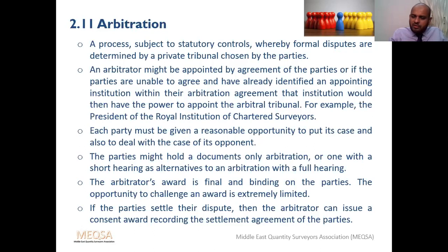They will favor the facts and evidence. So it is just a reference only. You will refer one arbitrator, the other party will refer another arbitrator, and both will choose the chairman. So how will the award be decided? If all three agree on the decision, there is no problem.